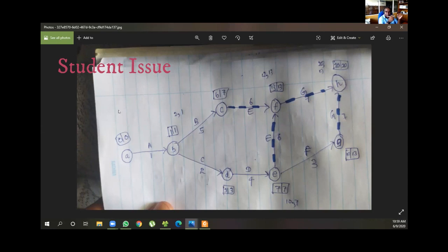So there should be one place where both D and B finish. A dummy activity basically short circuits it. Do you understand what I mean by short circuiting? No, sir. So the simple C should be the place where both D and B finish. That's why I have drawn a dotted line from your simple E to simple C.